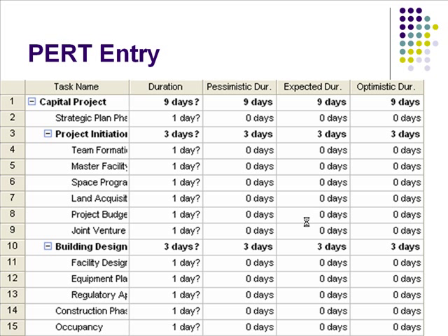This slide shows where the relevant pessimistic, expected, and optimistic durations of each task will be filled in as provided in the given data sheet. We will then use the PERT function of Microsoft Project to find the estimated duration of the project.